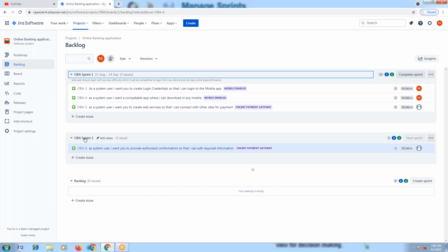In process of these 2 weeks, usually how 2 weeks we have calculated, I already told you. One is roadmap, timelines of the roadmap. Second, what will be the approximate time an epic will take, right? For example, if there are 3 user stories in that particular epic, we see how much time it will take for every user story to complete. So for that, you have to minimize that into tasks, because each and every user story will be divided into tasks.